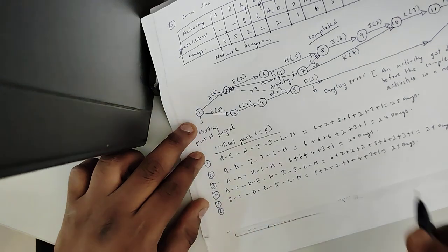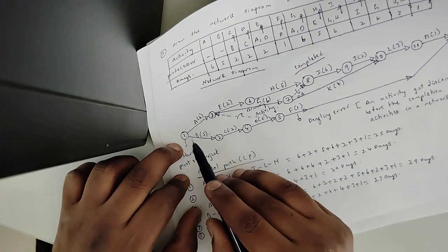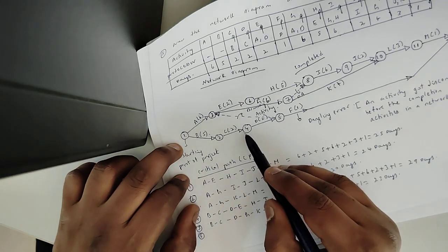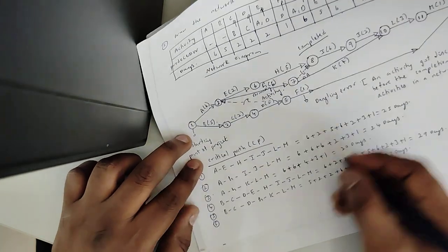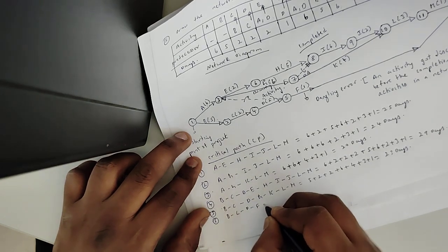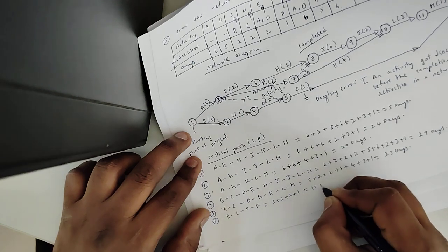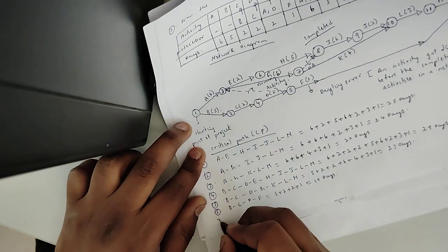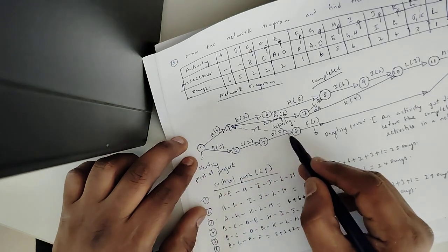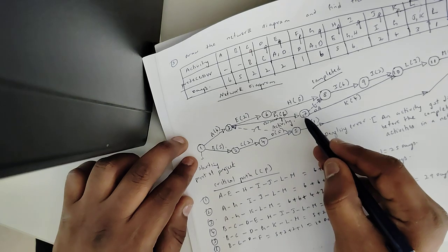Okay, and we will see the next sixth path. So sixth path again here B activity, C activity, then D, F. Okay, so that we will mention B, C, D, F. This 5 plus 2 plus 2 plus 1. It is 10 days. And last path for this is here B, C, D, dummy activity, then G,